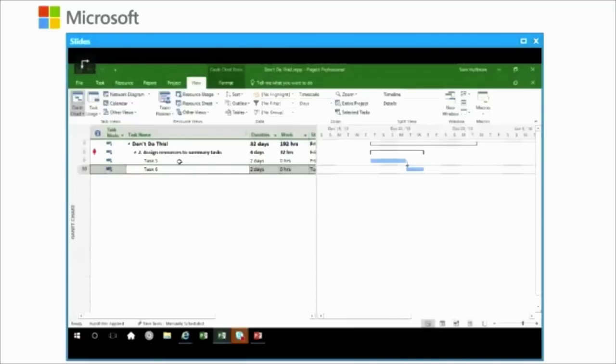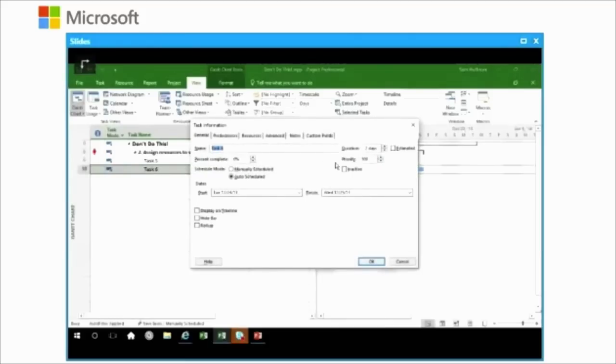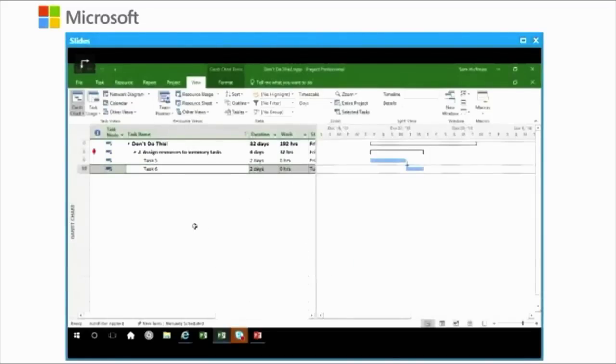Right. Shared resources, if it's a resource pool, you would level from the resource pool. Let me just say it like that. You know that you can have shared files that pull in their resources from a resource pool, but leveling in general, as a best practice, would be conducted from the resource pool. Bear in mind, you can have 50 projects, including the resource pool, open. So you want to make sure that the effect is what you want. You may also want to use the priority field. If you recall this, the priority field will help you as you start to level in multiple projects when you're using shared resources.